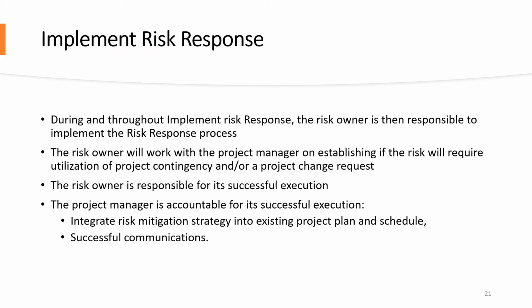The key is implementing your strategy into the project schedule. Let's use our previous example of needing an active internet connection ISP to ensure we do not impact the critical path of the equipment rack and stack. To meet our critical path, we need our ISP in place on April 22nd to ensure that we can commence the rack and stack of hardware on April 23rd.